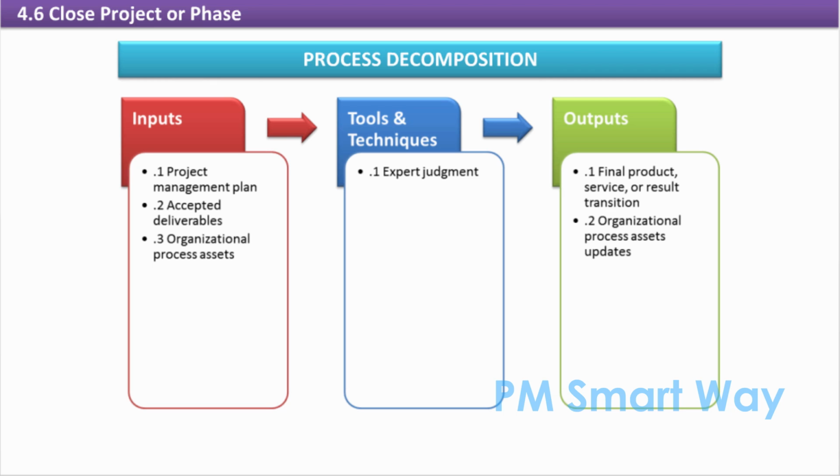as applicable. The close project procedure is also where the formal acceptance and handover of the final product, service, or result to the customer will take place. The close project process occurs even if the project is cancelled or otherwise terminated before fulfilling all its requirements.